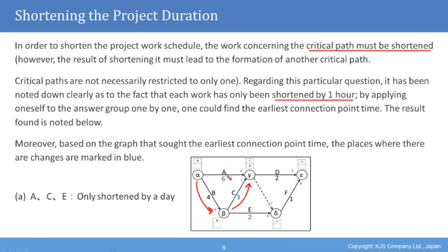So even though A has been shortened by 1 hour, that makes absolutely no difference at all, because C takes 3 hours and B takes 4 hours, which means that you have to wait 7 hours at gamma. So it has to be 7 o'clock earliest at gamma. So it kind of feels like we've wasted shortening 1 hour, but we'll see what happens.